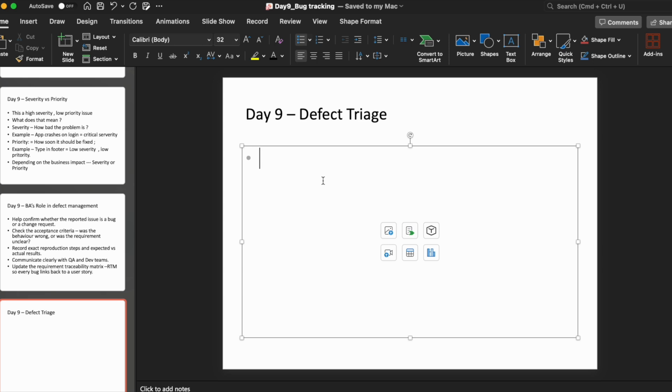So the defect triage I'm talking about is for regular bugs. What do you do in triage? First, review open defects. If you have some defects in the backlog, you can review them. First step, see what the priority is and what we should take based on the severity.